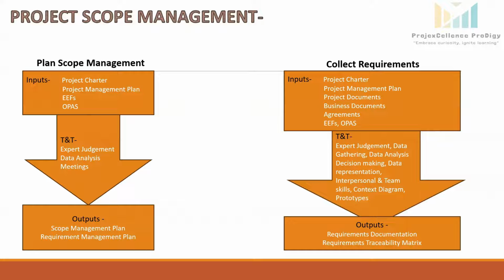Different installation methods can be analyzed, whether rooftop or ground mounted, to see which one would be feasible for our project. Alternative analysis could also be applied to choose between different energy storage solutions. For example, we may want to connect our solar system with a battery storage system, or connect it directly to the power grid, depending on the project need for energy reliability and cost effectiveness.